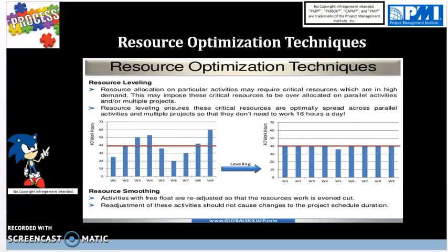But keep in mind by doing so, that by allocating the extra time for a different day, does not meet the schedule baseline target date of completion, which will run into the risk of lengthening the schedule and will require a change request from control schedule process, giving a longer schedule, prolonging the project, and might also eat into the budget. So it is mindful to be very careful when to do this.